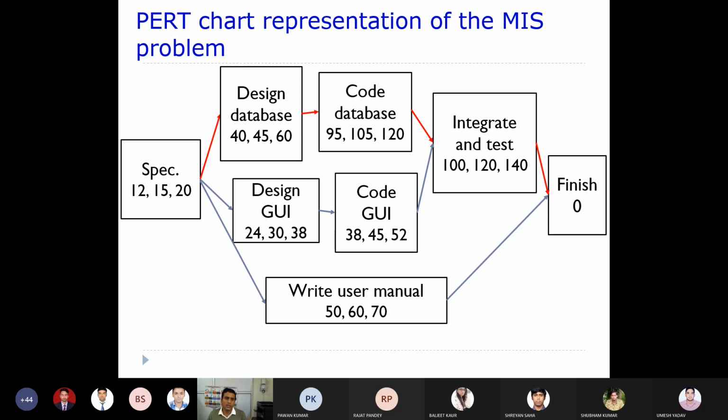Once you get the average estimates for each and every task, you can again find the critical path considering those averages, and you can also calculate slack time. This would be an average estimate of everything in probability terms. If you follow some sort of distribution usually, you are going to get the values in this way.